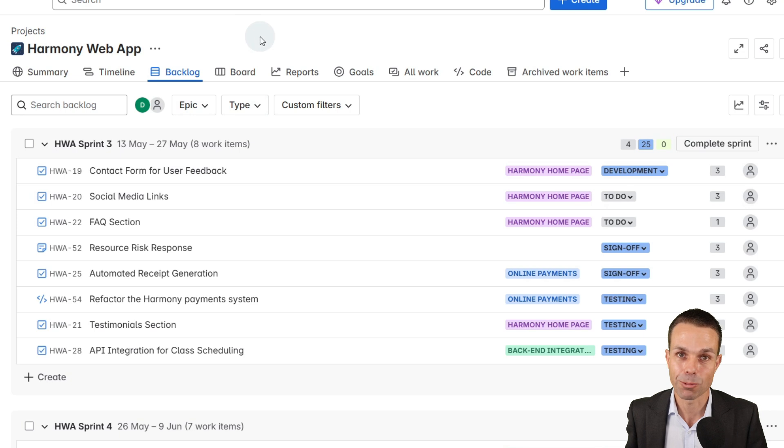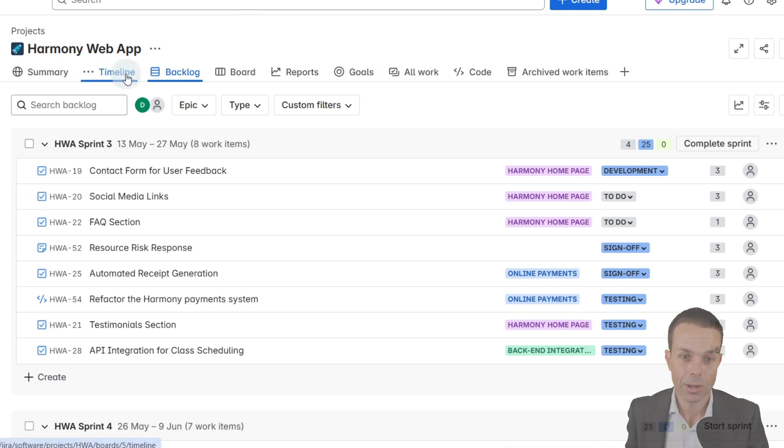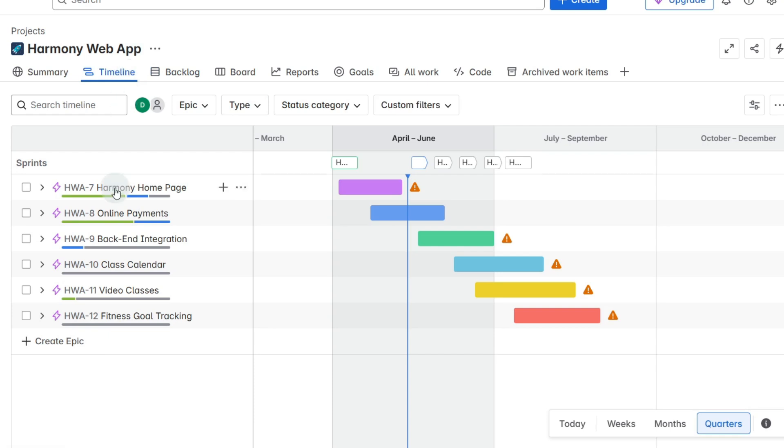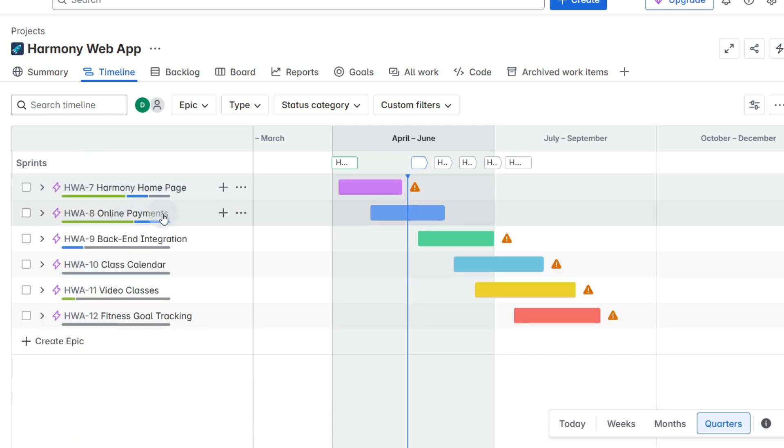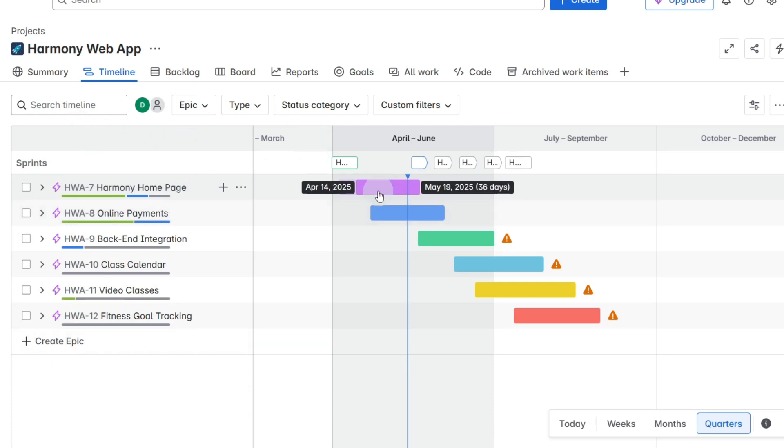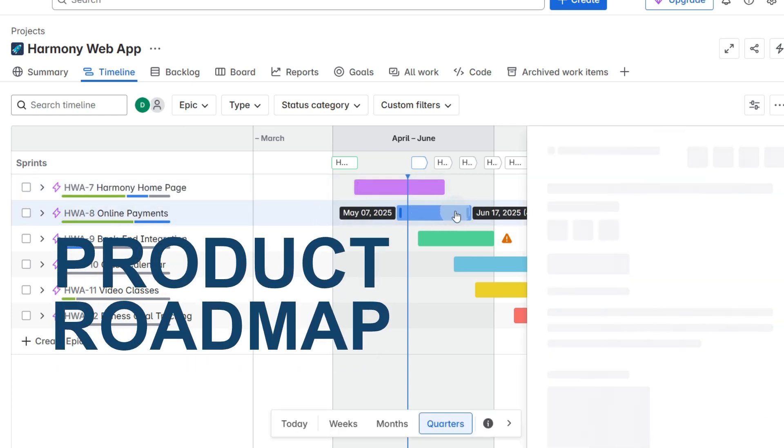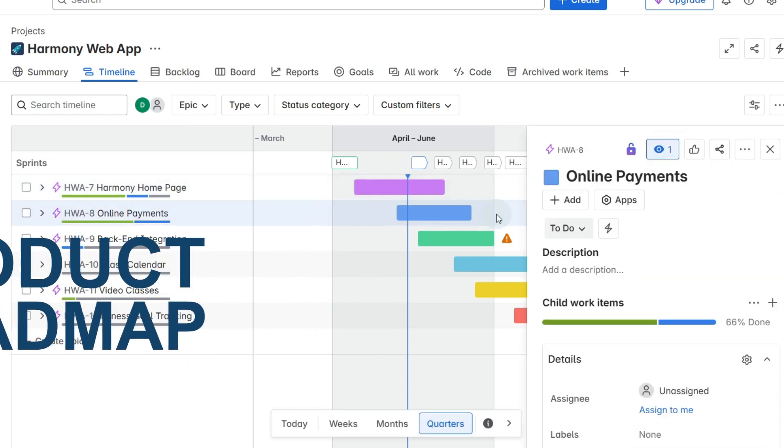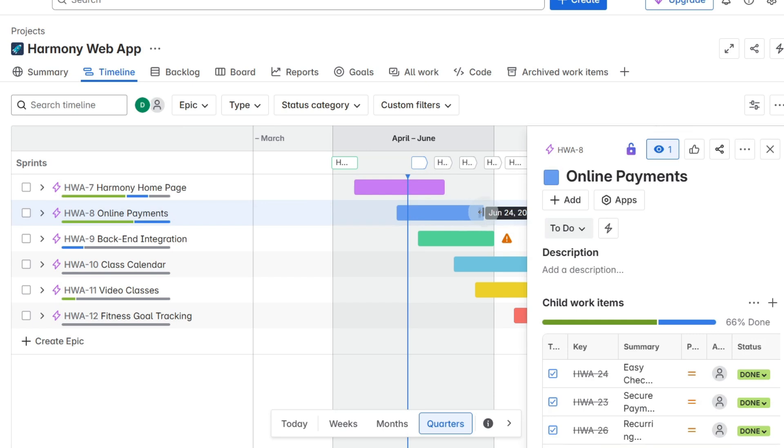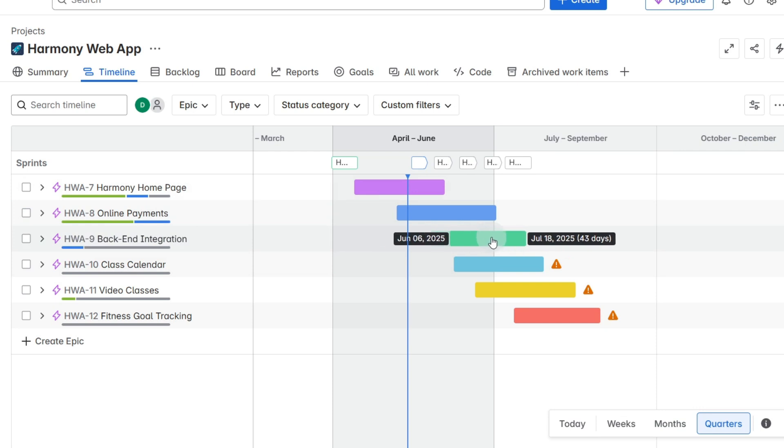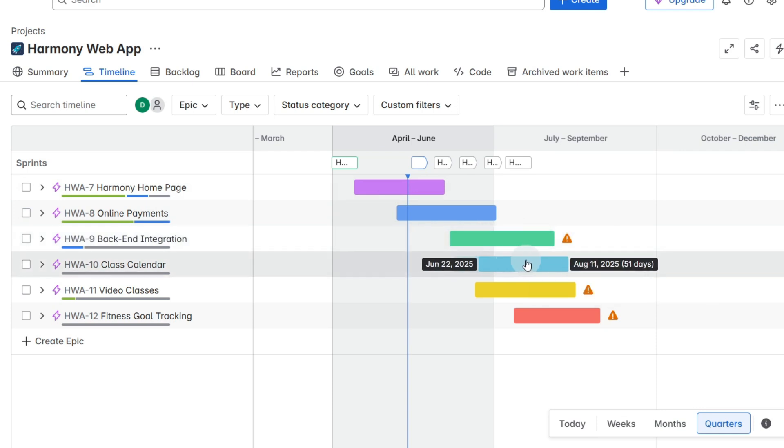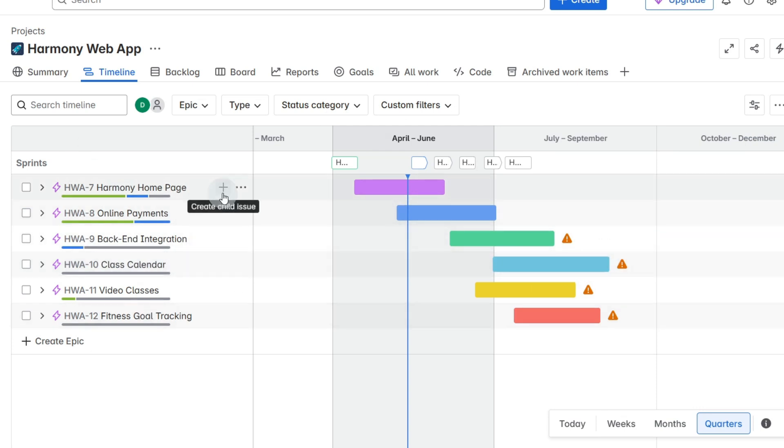One last thing that we'll want to do, especially for the product owners in the team, we can go to our timeline and here are the epics, the high level features, and here are all the user stories within them if we click that drop down. But just at a high level this is a wonderful way to see it. We can move this very easily. This can become our product roadmap, so now with our product roadmap we can see at a glance it's like a Gantt chart where our items might be starting and finishing, and that's going to give us something to talk to with executives or stakeholders as they can see those features being completed.